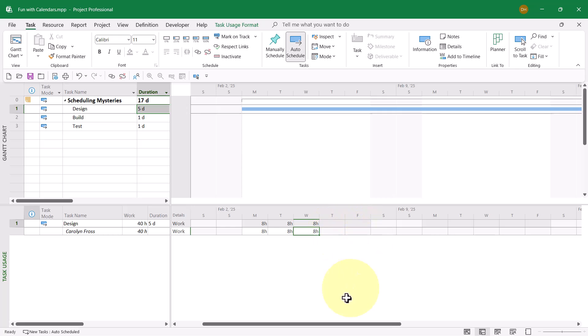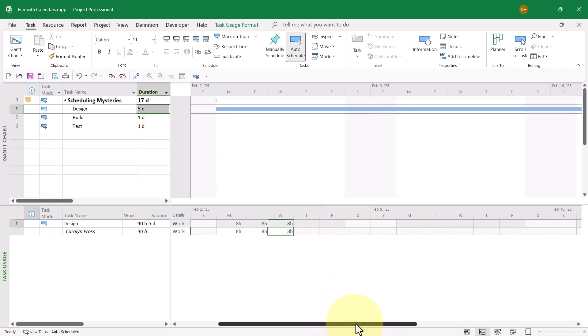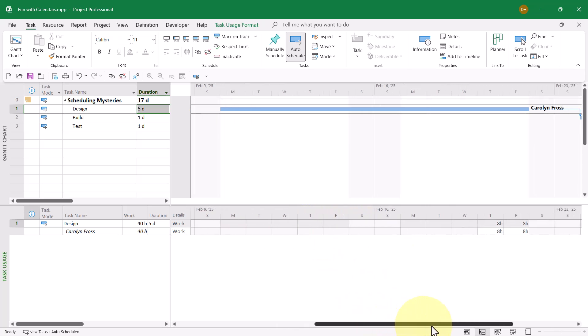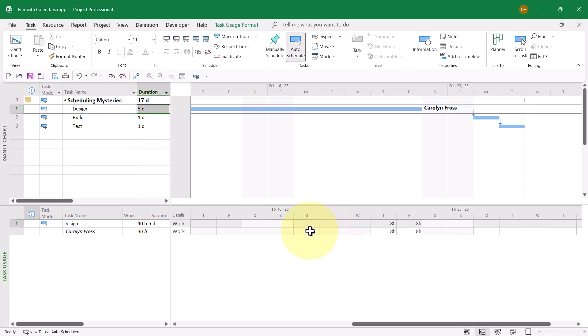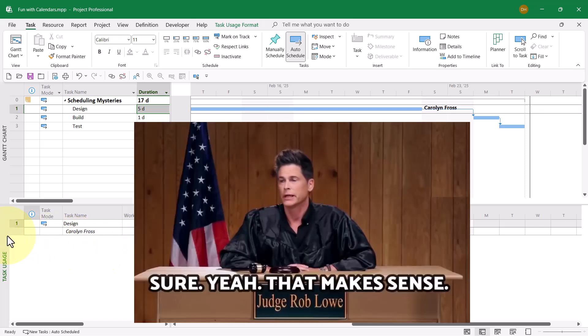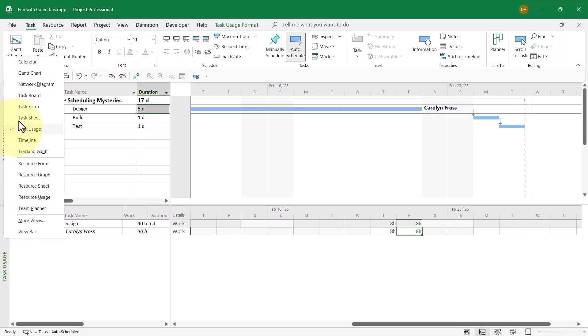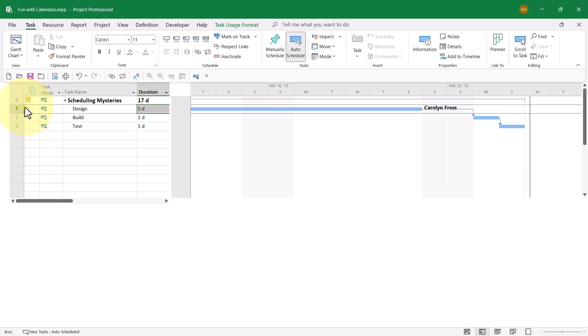Then nothing the remainder of that week. No work scheduled the second week. No work scheduled the first three days of the third week, plus two more days. So there's five working days over the time span of 15 days. The five days of duration is correct, and the schedule of the task is correct. Now let's go back to the task form pane.